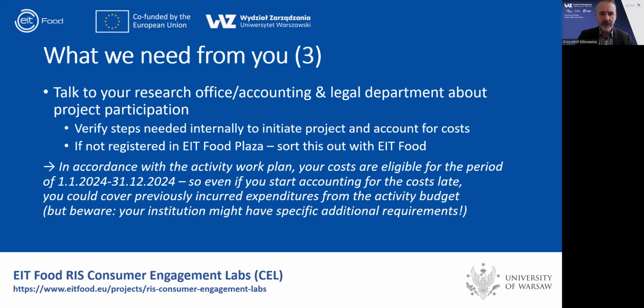So verify some internal steps that you might need to take to initiate the project, to account for costs. And again, for those of you who have accounting questions, formally, you will participate in the project in this calendar year. So even though the selection was done in February and most of you are planning to start the work in March, don't be surprised when in the final cost report, you will just report the participation starting from the 1st of January, finishing on the last day of December.